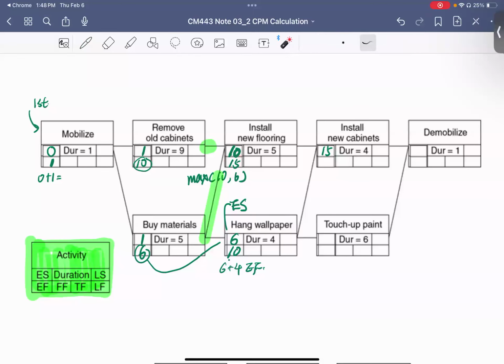And so the early start is going to be when that finishes. So yes, you have the 2 here because you have the 2 relations here, right? So you needed to use the maximum one from this. That will be the maximum of 15 or 10, then you get 15. So you have 15 here.